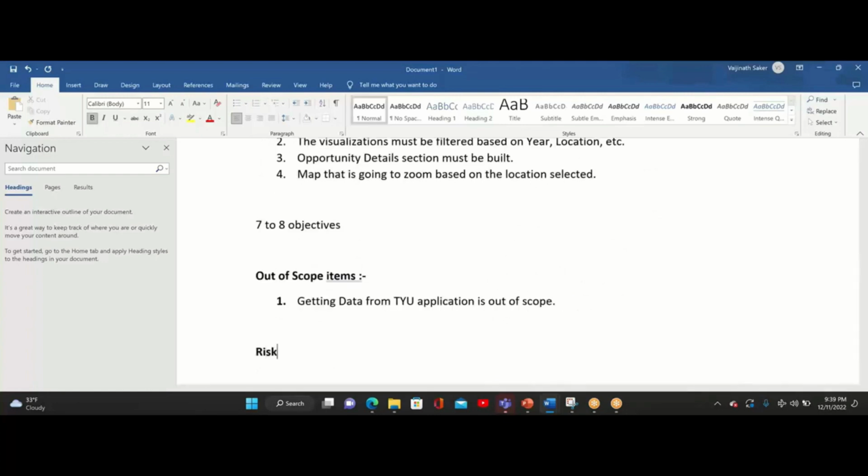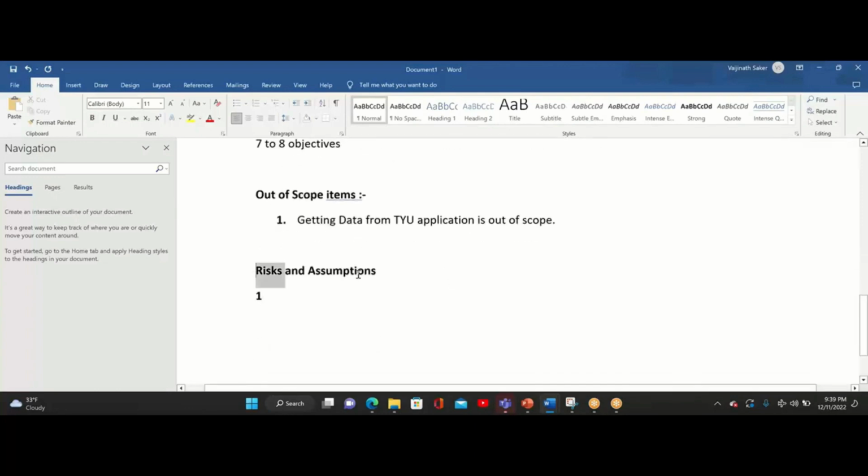And then we'll have risks and assumptions. A good example of a risk, to a certain extent, you can use these terminologies interchangeably. If you want, you can use them separately. Anything that's not in your control will be a risk. Again, anything that's not in our control will be a risk. A good example is, we have multiple upstream external dependency with POLT.